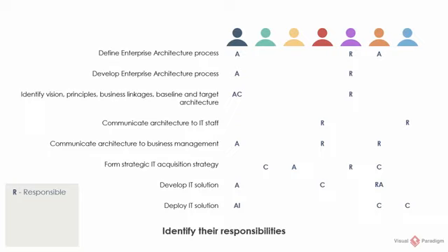Responsible means the person who will complete the task, and is responsible for the actions and implementation. Accountable, denoted by A. Accountable means the person who holds the power to authorize actions or implementation. Evidently, answerable for the correct and detailed completion of the deliverable task. Consulted, advice and opinion can be obtained from this person. Usually subject matter experts take this role. Informed, person who will be kept up to date mainly upon completion of the task or deliverable.